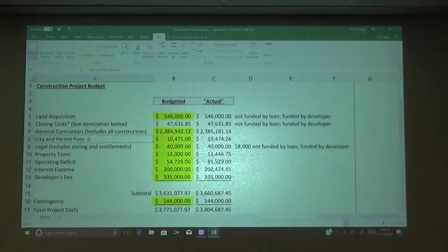They might give some idea of what sort of exterior cladding you're going to have, and maybe some of the finishes. But the construction documents, drawn up by the architect, are much more detailed, with very precise measurements and very precise detail on every component of what materials are being used. It's a whole other level of documentation, and it's a lot more expensive, because the first piece is more the creative design piece, whereas the second piece is more the operational piece. Okay?